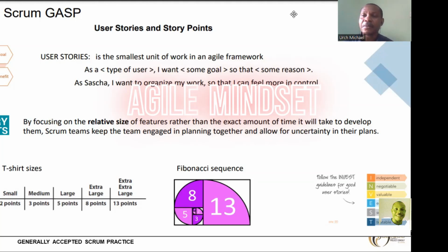But you can have a building project where you have the foundation, you have the DPC, you have the block wall, you have the suspended slab, then you have the block wall again, then the next suspended slab, and all that. It keeps going till the end of your building, to the roof. So you're going to break this down into different phases. You are excavating the foundation trench, you are blinding, you're casting the column footings, depending on the nature of foundation you want to do. You're breaking this down into different pieces.